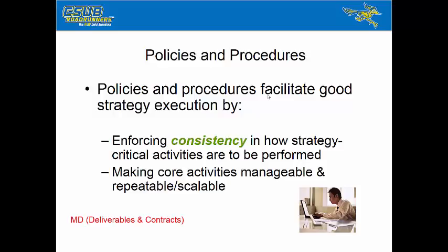And I had a lot of trouble crafting contracts that would say, okay, I will do this, this, this, and this. This is how I will deliver it. Once I have given you this file, I am done with what I am required to do for you. Otherwise, people were constantly saying, oh, well, this is nice, but I want more. I'm not going to pay any more, but I want more. It's very important that you write up your contracts and write up the deliverables of what you're doing to be very exact about this is what we do, this is what we don't do.